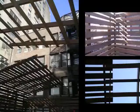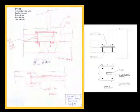And you can see here the varying levels of density. And of course, there's always some kind of structural issue. So we had these wonderful cantilevered posts that were designed to anchor into the concrete slab of the roof, and we didn't do any initial probes because we couldn't jeopardize or risk the water penetrating into the dwelling below during the early design stages. But when the contractors opened up to see the slab, there was actually very little, if no, tensile force or reinforcing rods to counteract the cantilever.